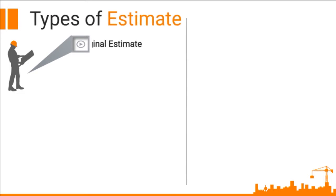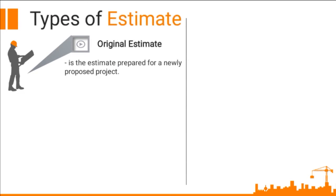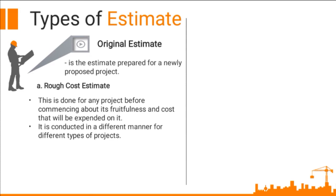Types of estimate. Original estimate is the estimate prepared for a newly proposed project, and it has two ways: the rough cost estimate and the detailed estimate. The rough cost estimate is done for any project before commencing, about its fruitfulness and the cost that will be expended on it. Sometimes the rough cost estimate can also be obtained by comparing cost expended over former project experiments and the undergoing proposed project. Under this also falls contingencies — these are additional charges that have to be made on an urgent basis during a project and cannot be predicted.